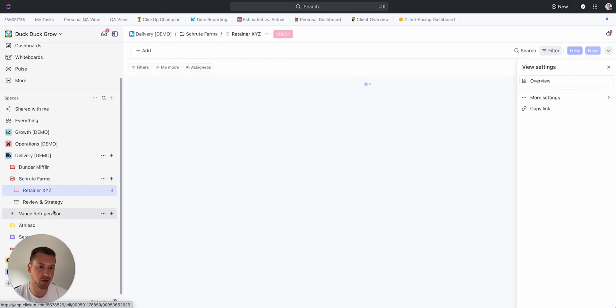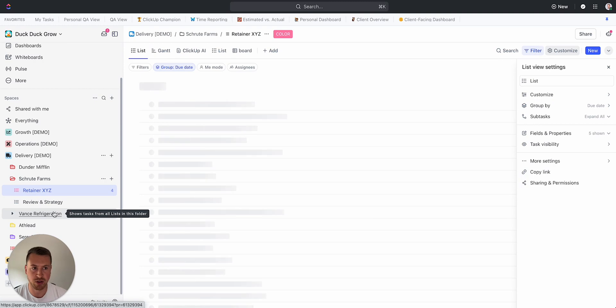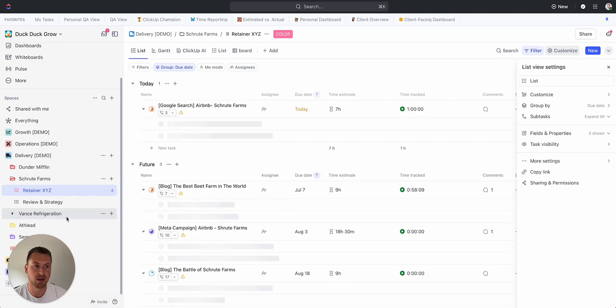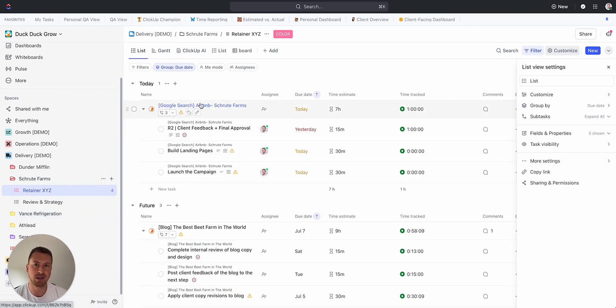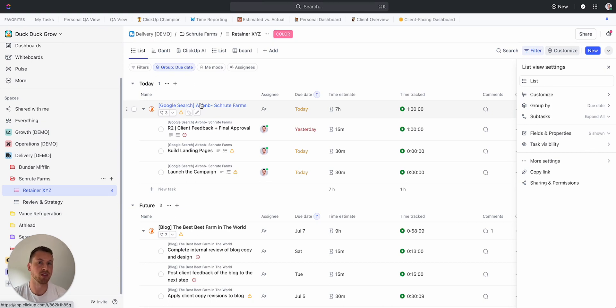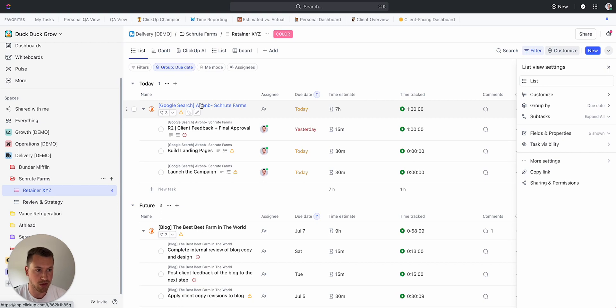The bigger part of this is going to be how I actually structure my tasks. The way that I recommend is your parent task is going to be the name of the deliverable, and then all the subtasks are going to be the steps that are actually needed to complete that deliverable.